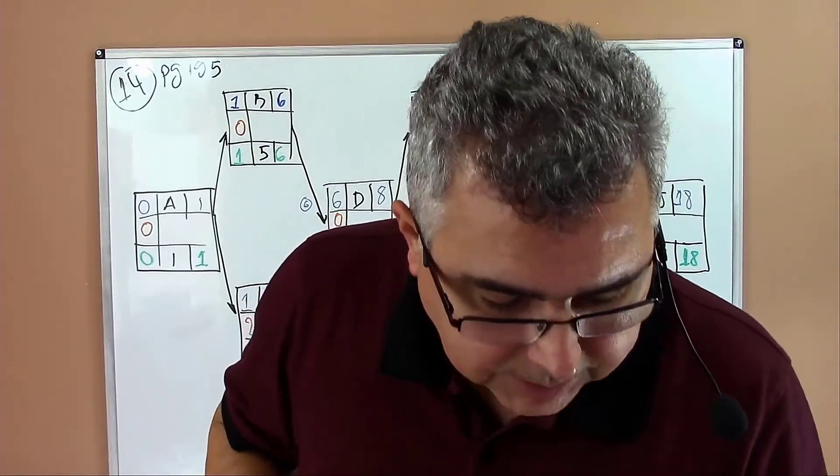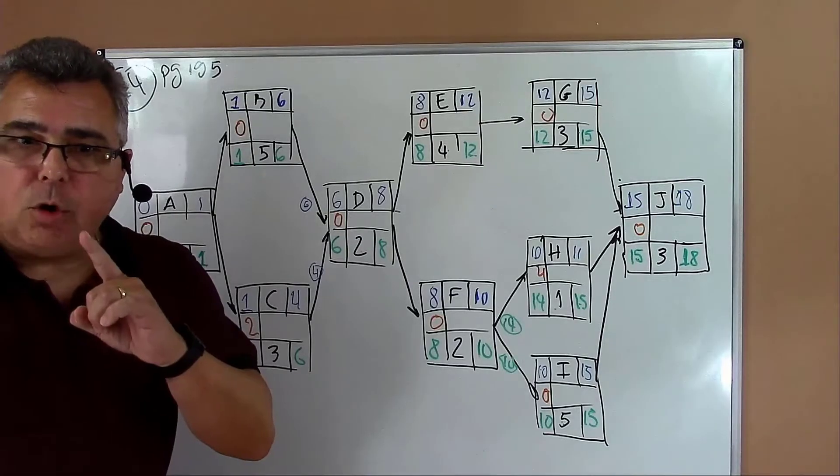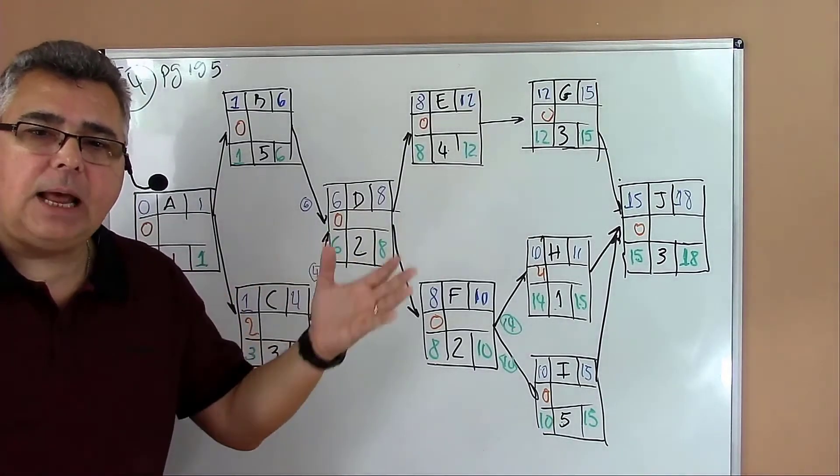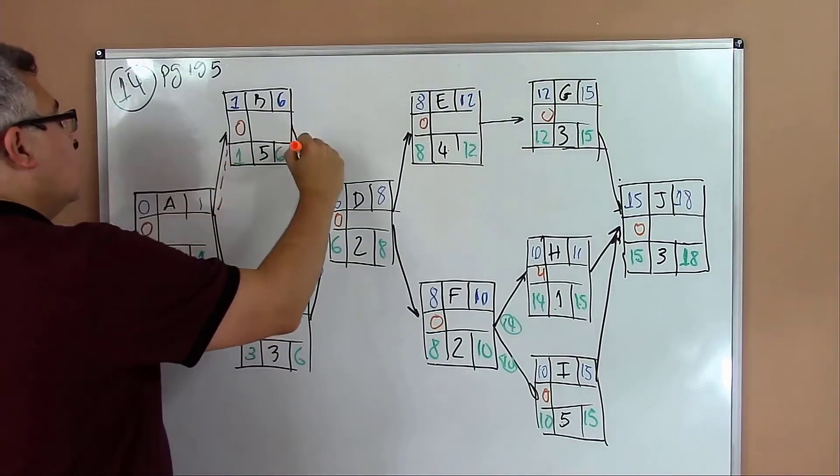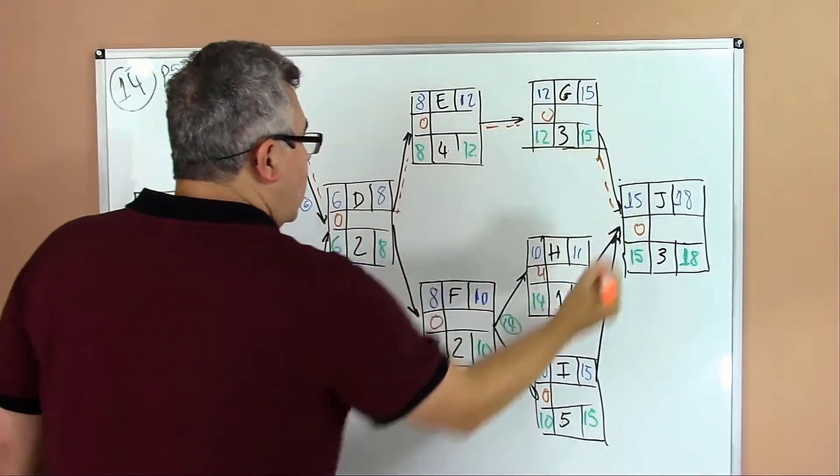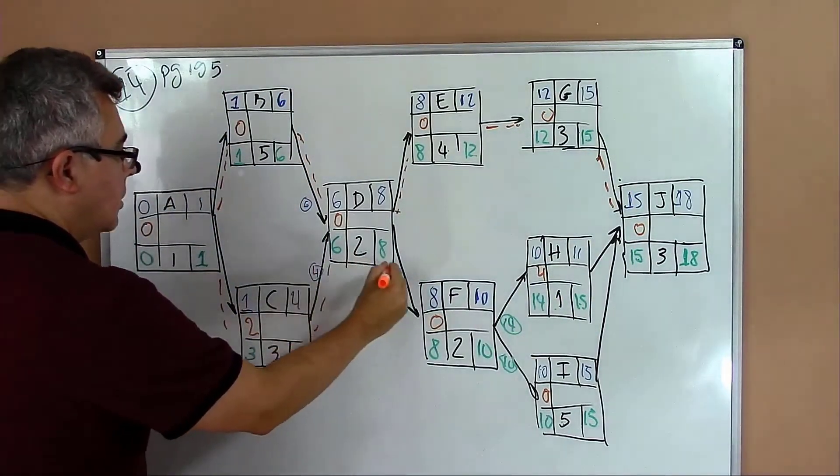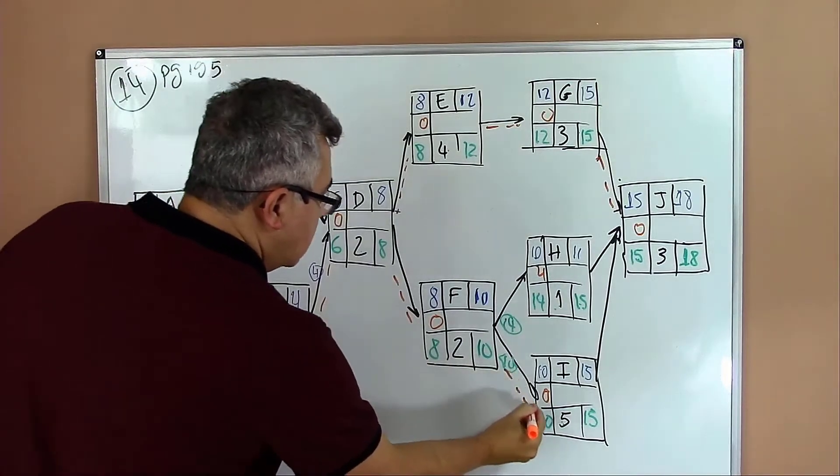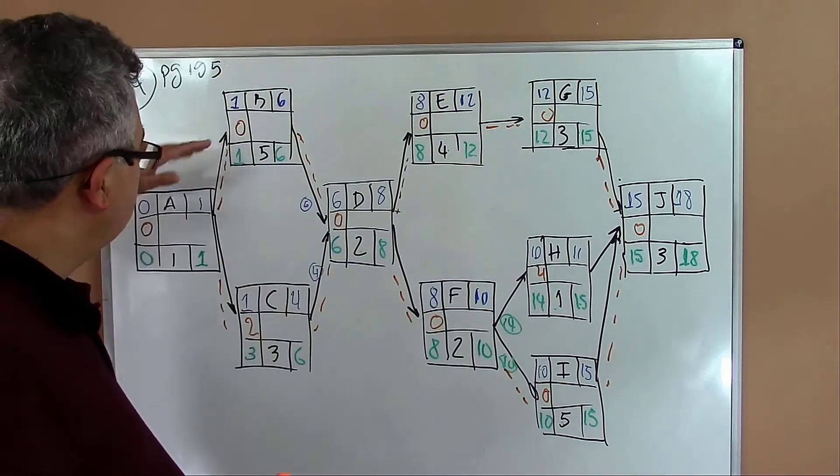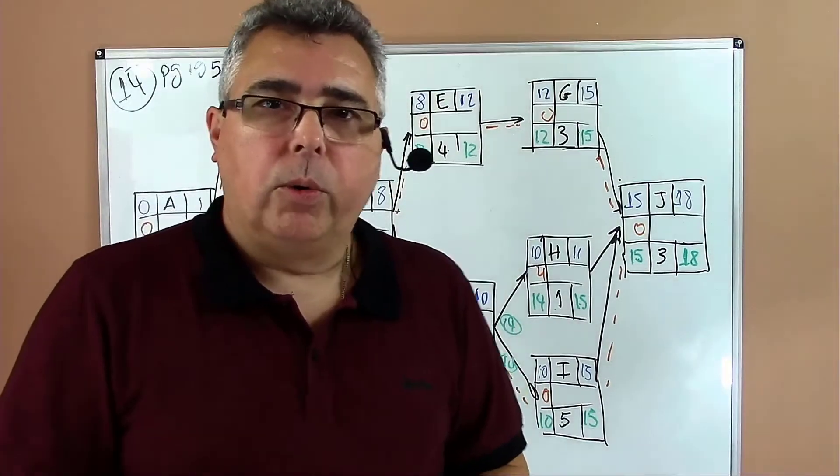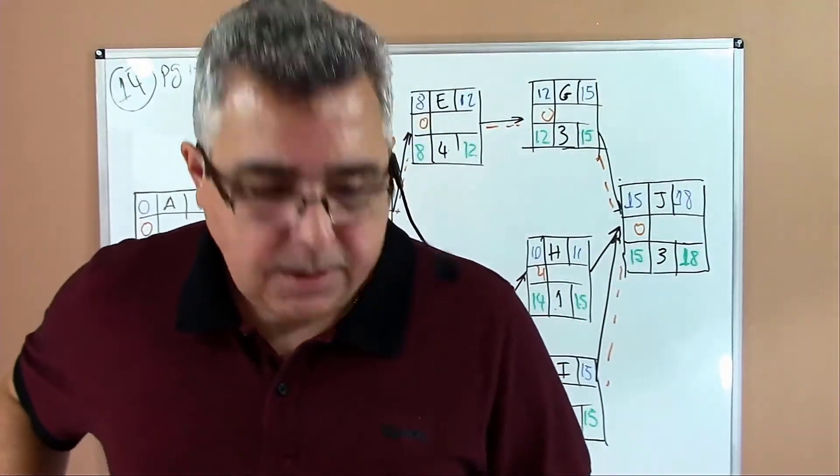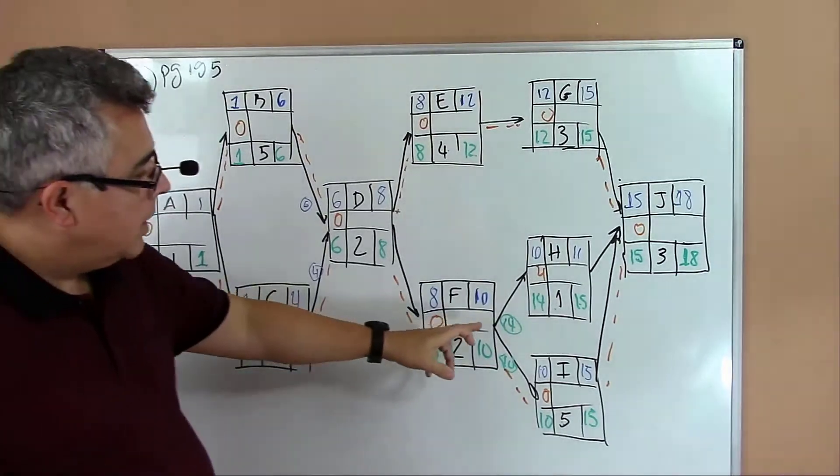There is another part of the question that asks us to identify the critical path. The critical path is the path in which the activities don't have any slack. Here we have one path with no slack, but as well we have another critical path. You have two critical paths actually. It can be more than one because you can go here and combine. You have multiple critical paths in exercise 14.